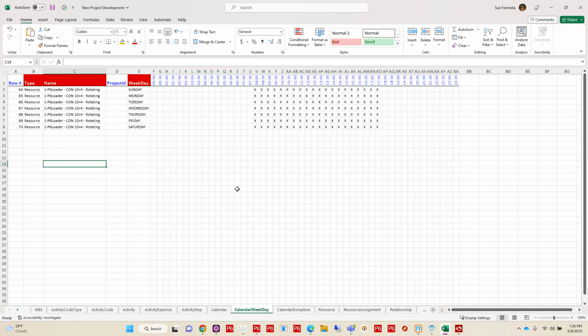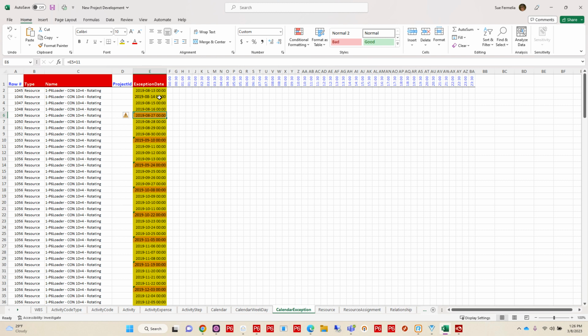I'm going to define my work time on my calendar weekday sheet. So Sunday through Saturday, 8 a.m. to 5:30. And then on my exceptions, I am going to use a formula again to calculate my exceptions to my work days.